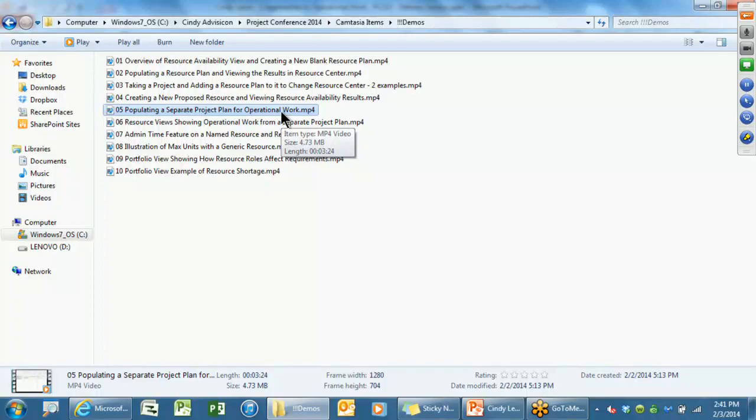I'm sorry. Go ahead. Is there a way to work with a mix between committed and proposed? You can. What you do is you set up the resource. You could set the resource up as proposed, but when you get to the schedule, there's an option to make them committed for the project or committed for the task. That's your call. And that's at the project level, but what about the resource plan level?